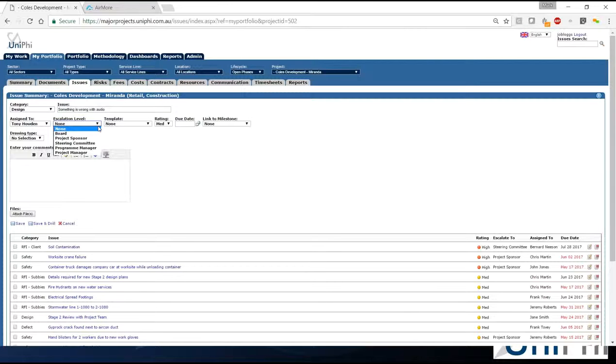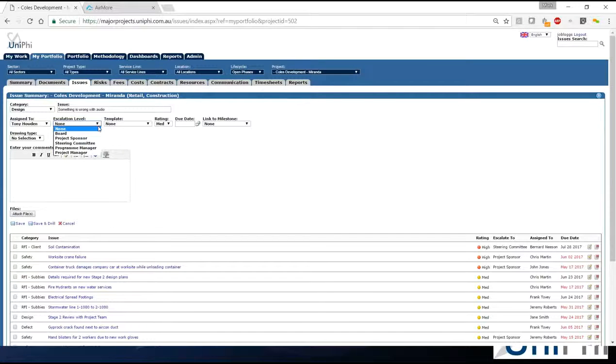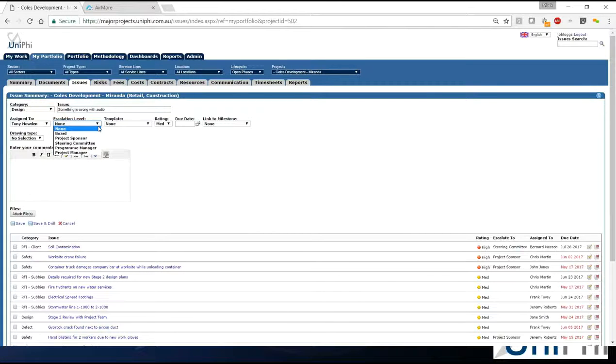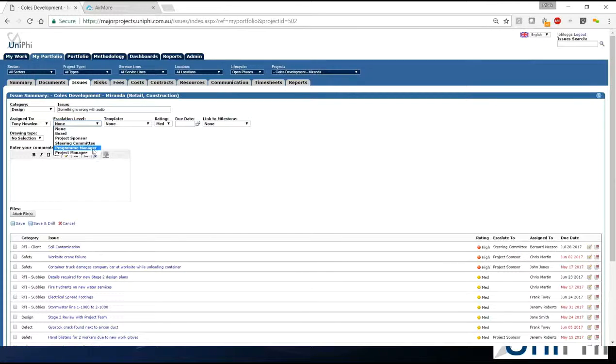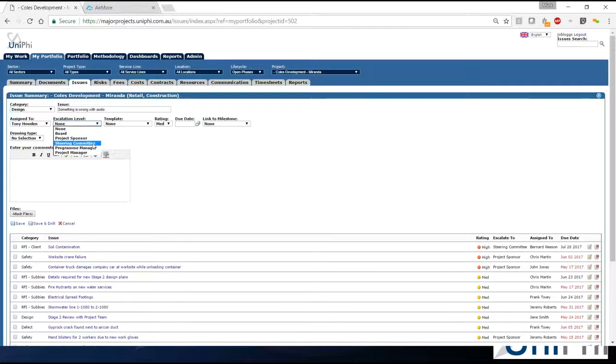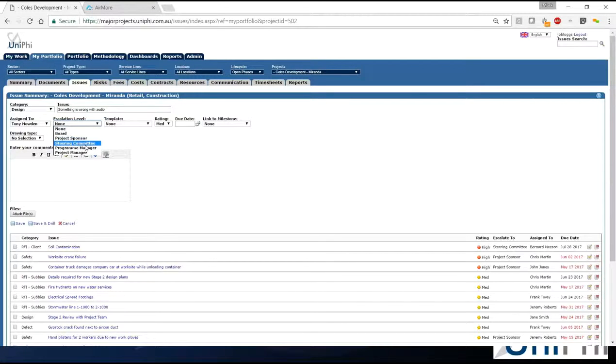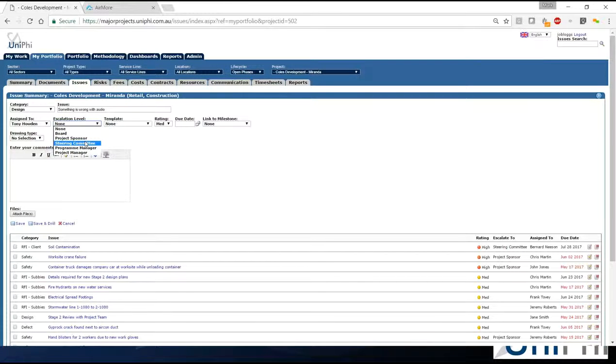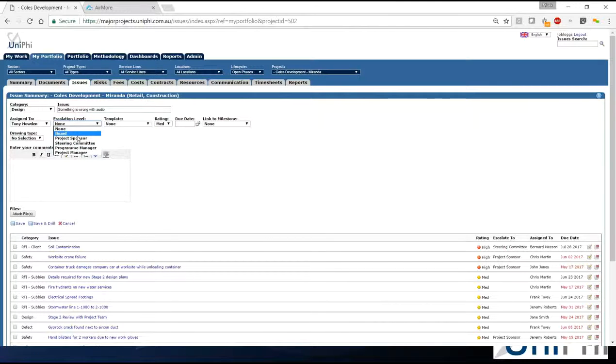Then you've got an escalation process that you can use. Basically, this is a way of reporting information to key stakeholder groups without needing to assign the information to them. They can then filter or you can filter and report for those groups. It actually works as a hierarchy. So if you've escalated to the steering committee, the project manager will understand what's been escalated to everything above him, program manager everything above him, steering committee everything above him. The functionality works the same though. It's a hierarchy of escalation. For example, the board would only see issues escalated to them, where a sponsor would get board and sponsor.